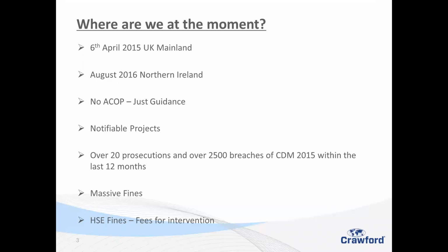The changes also brought in notifiable projects. Before, it was quite straightforward, over 30 days, but now it's a case of breaking it down into man days and how many operatives are working simultaneously on a site. The fines, well, what can I say about the fines? They're huge now. As we've probably seen on all our HSE documentation, on their websites, in IOSH magazines and the likes, it is just going through the roof, and I'm wondering how people are going to pay for that ultimately.